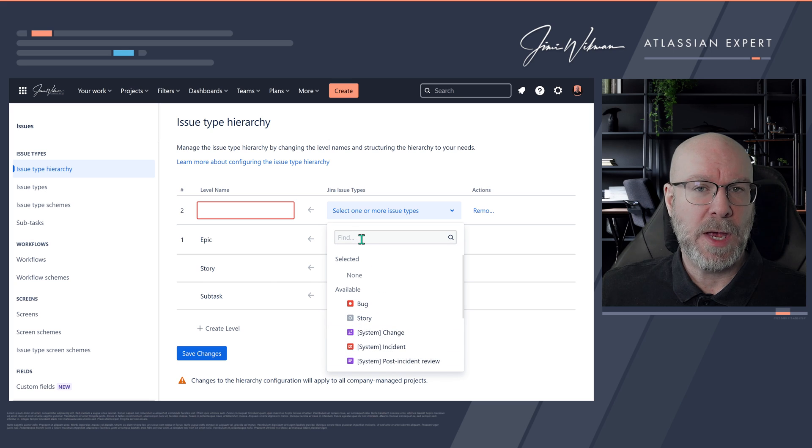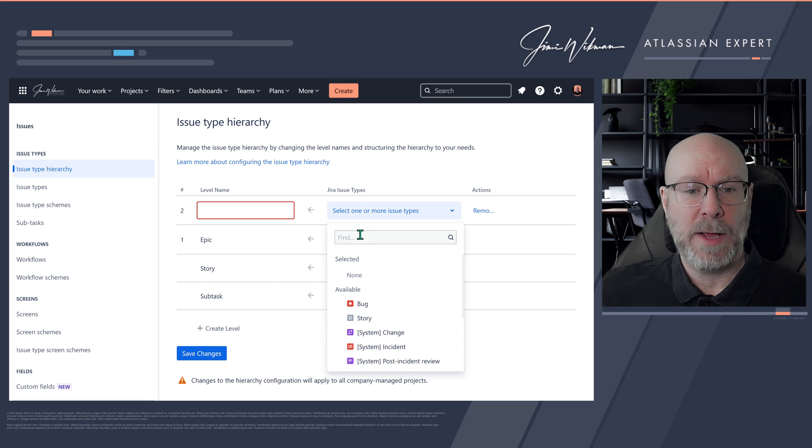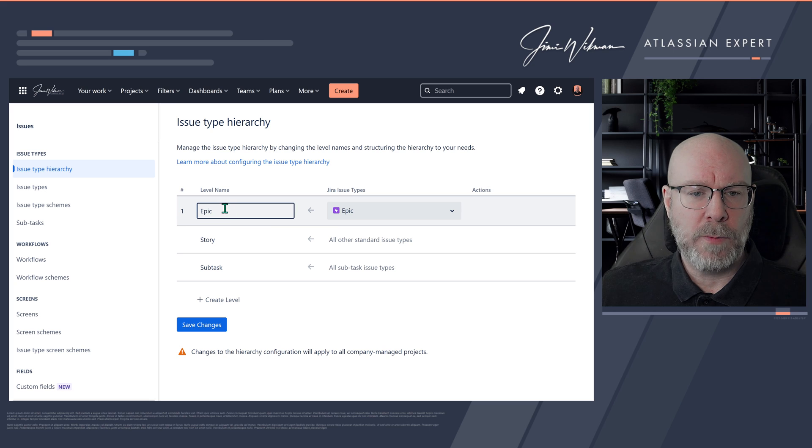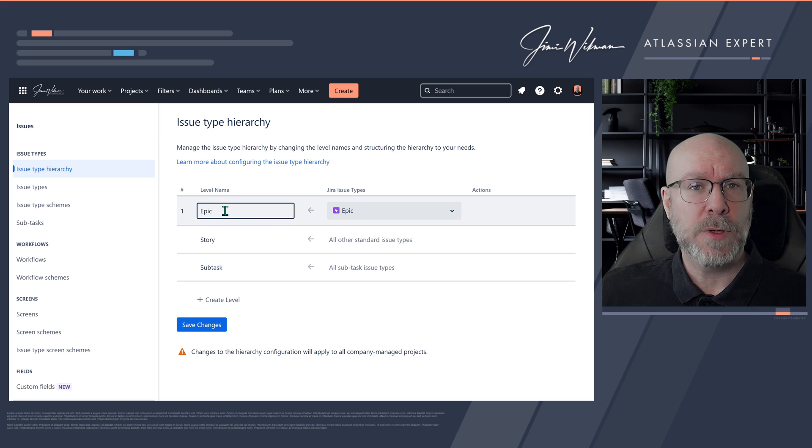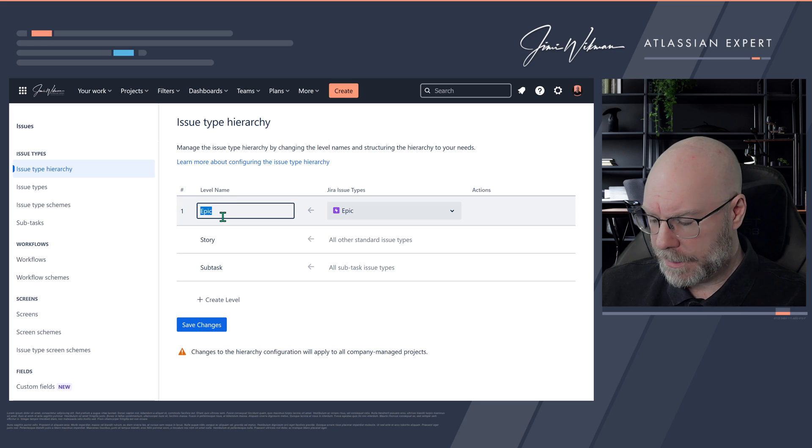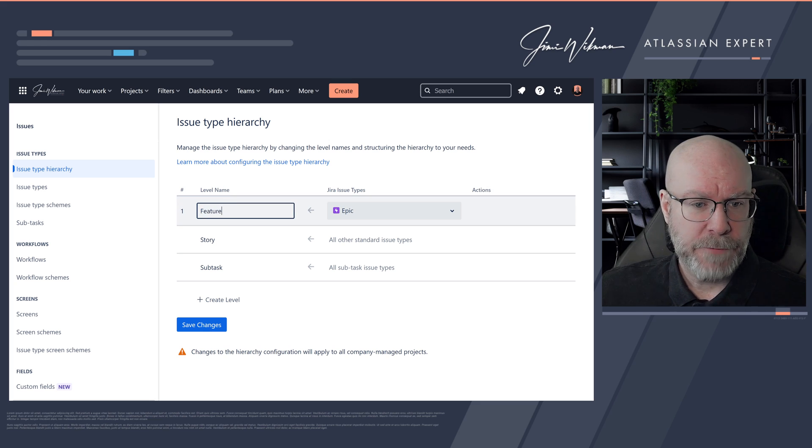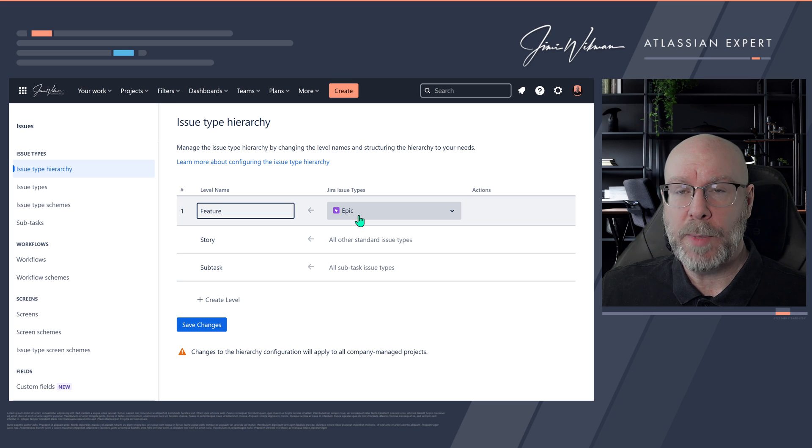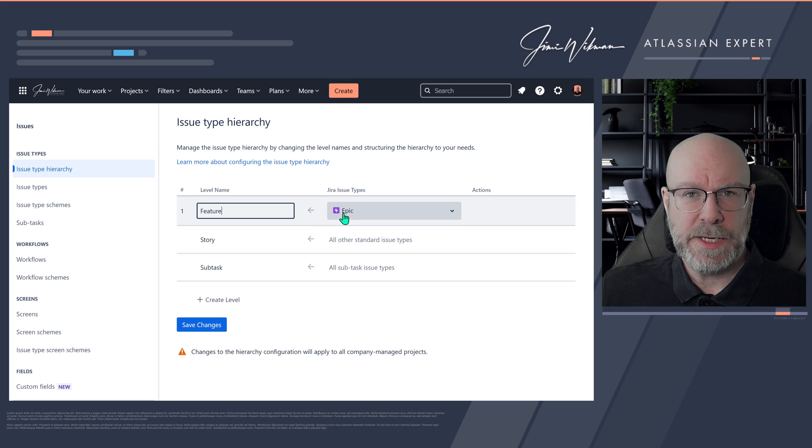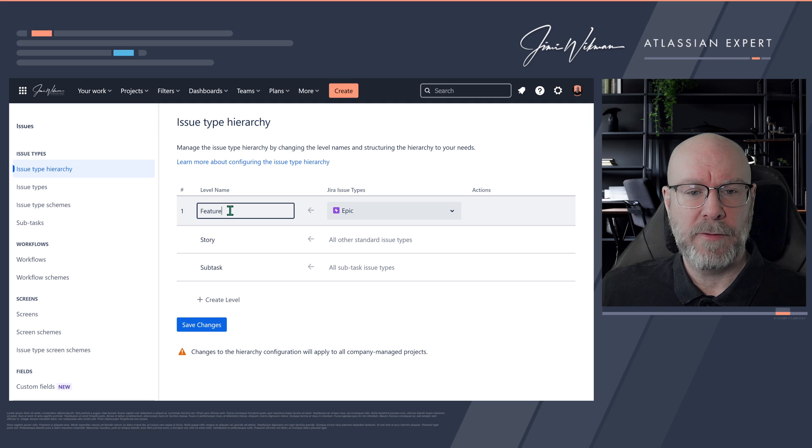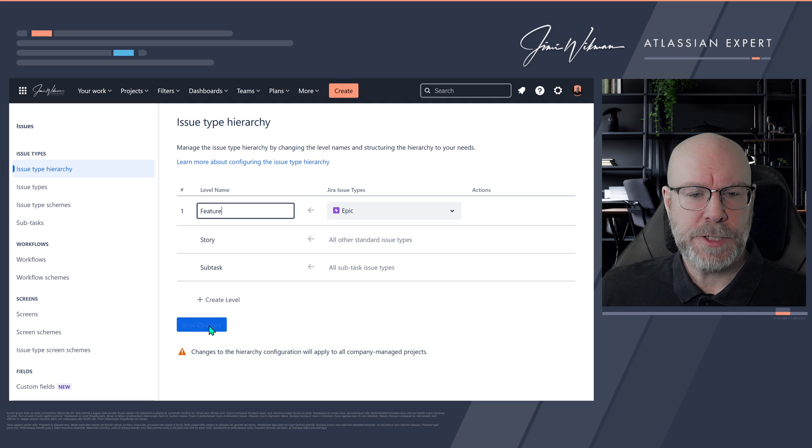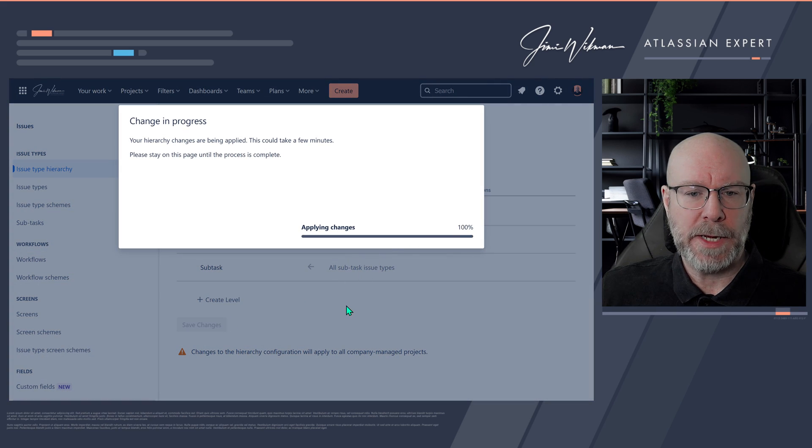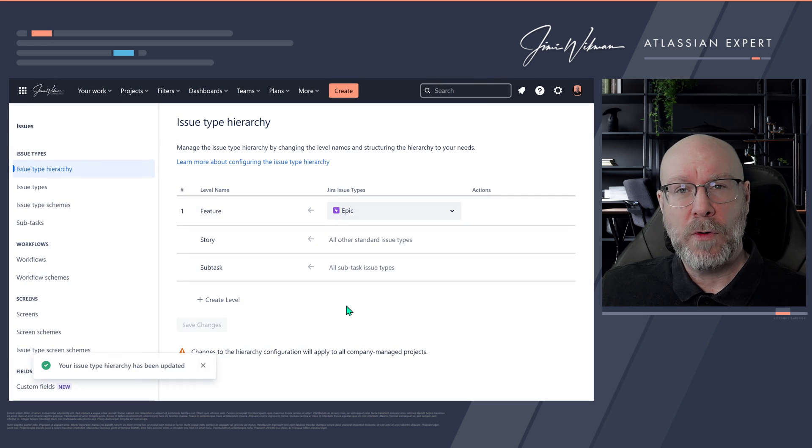But today all we want to do is to change epic to become a feature. So the only thing we need to do is go in here, and on the level name we will change this to feature. We can still have the issue type epic—it doesn't matter at all, because this is the issue type name and this is the functionality name, the level name. If I click save changes here, you will see it will apply changes and this will now override everything that you have in your instance.